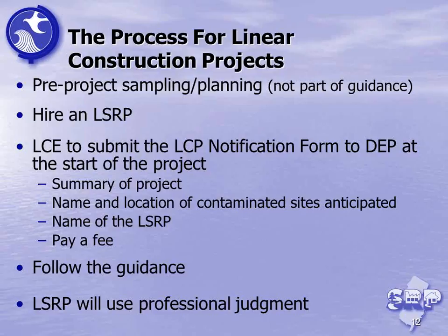Okay, the next two items are going to be in the rule. We're going to be requiring linear construction projects to hire an LSRP and to submit a notification at the start of the project. They have their very own form. I'm sure you'll be happy to know. And they're just going to give us a summary of the project, the name and location, contact people, who the LSRP is, and they'll pay a relatively small fee.